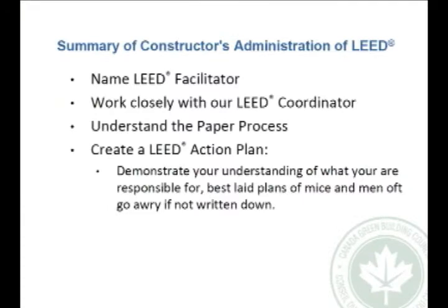Summary of the contracts administration for LEED. They've got to name who's going to be their lead facilitator. A small project, it could be the superintendent. A larger project, due to the immense amount of paperwork, there may be one individual dedicated strictly to all the paperwork that's required for the documentation for LEED. They work closely with our LEED coordinator, who's identified the points, tracked them, and is looking for them to come in. You have to understand the paper process and why it's important.